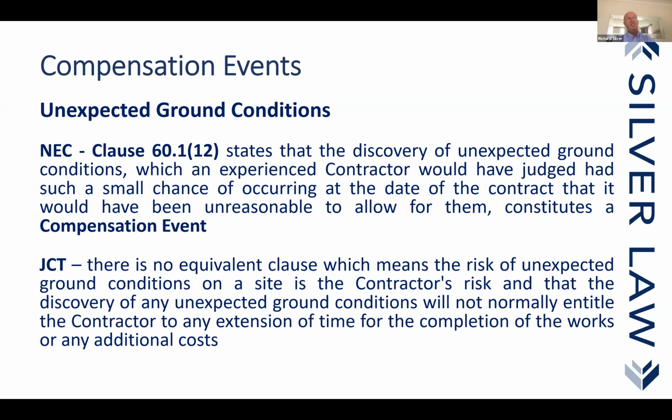But the employer can still have a liability for misrepresentation. The employer has issued something to the contractor upon which the contractor has relied and which has been found to be wrong. That is misrepresentation, for which the contractor can claim damages.